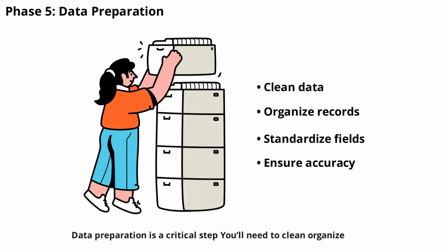Data preparation is a critical step. You'll need to clean, organize, and format your existing customer data for migration into the new system. This may involve deduplication, standardizing fields, and ensuring data accuracy. Depending on data volume and complexity, this phase can take 2 to 6 weeks. Proper data prep reduces errors and ensures a smooth transition.